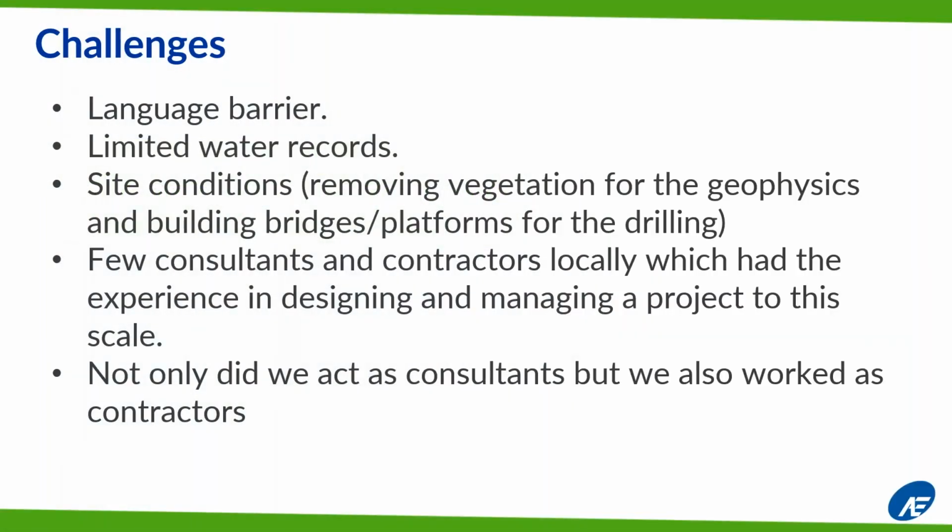Some of the challenges was just the language barrier. As I said before, we had limited groundwater levels. They were only measuring once a month, and after the first field visit in phase 1, we suggested that they install water loggers so that they could have daily records of the groundwater levels.